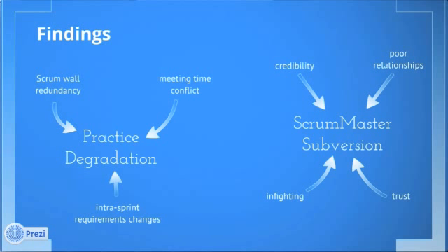The point of standing up, right, is that standing up for long periods makes you uncomfortable. So it produces this motivation to get on with the business and then go back to work. But there was no such motivation, and so the Scrum meetings tended to run over. But because they ran over, people viewed them as more disruptive, and then they didn't want to participate in them. So after a little while, nobody was participating in these Scrum meetings.